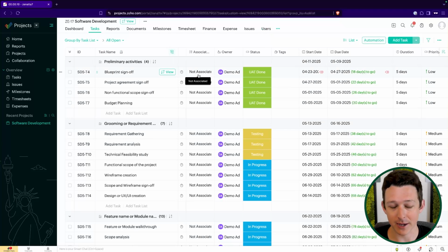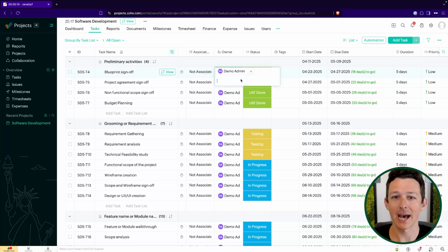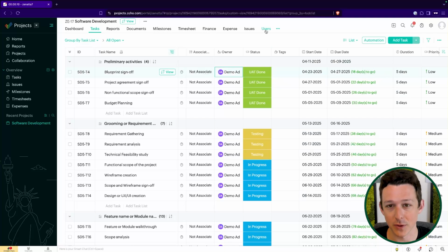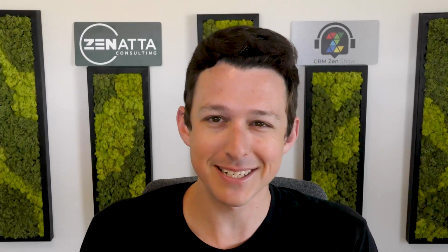We hear this all the time. Someone comes into a client meeting with us. They're like, hey, I've got 20 users. They're all inside of Zoho Projects. Why can't I set John as the owner of a task? And we go, hey, is he a user of the project? Because he's a user of the app, but he also needs to be a user within the individual project. So I always like to highlight that. It's a common stuck point. You're not crazy if you've been stuck there before.